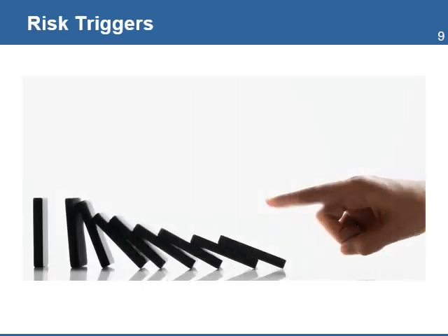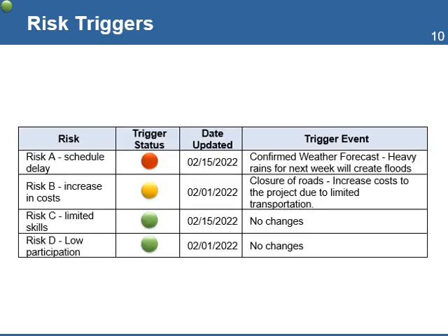Risk trigger is defined as an event or conditions that cause a risk to occur. For some types of risk, it is easy to identify the triggers or situations that can cause a risk to occur. For example, schedule disruptions caused by transportation strikes, budget changes caused by currency fluctuations, or severe weather events can be monitored closely by following the news and other sources of information that give indicators about the proximity of the risk event. Each risk in your register should have a list of trigger indicators that you can use to monitor during the life of the project.